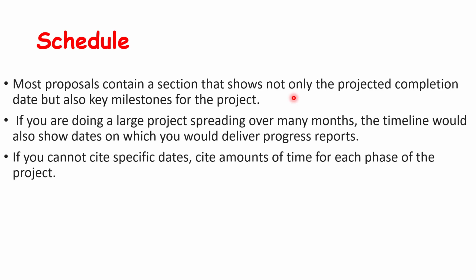The second thing it might include is a market study for acquiring or buying the things that you need. The next might include the assembly in the lab. The fourth might include the testing. So those are the key milestones of the project. And if you include that in your schedule, then it persuades the audience more.